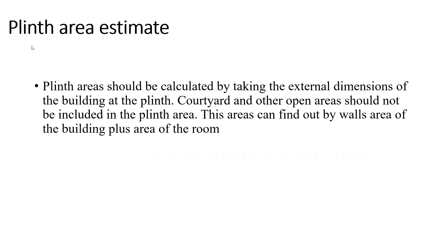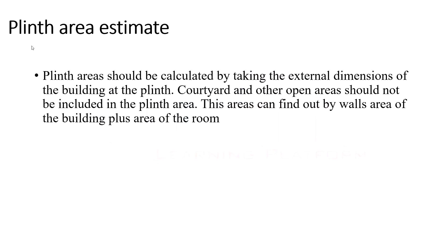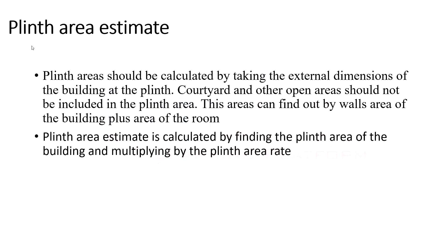For the plinth area estimate, the plinth area is calculated by taking the external wall dimensions of the building. Courtyards and open areas should not be included in the plinth area. The plinth area can also be found by adding the walls of the building plus the floor area of the rooms. The estimate is calculated by multiplying the plinth area by the plinth area rate.